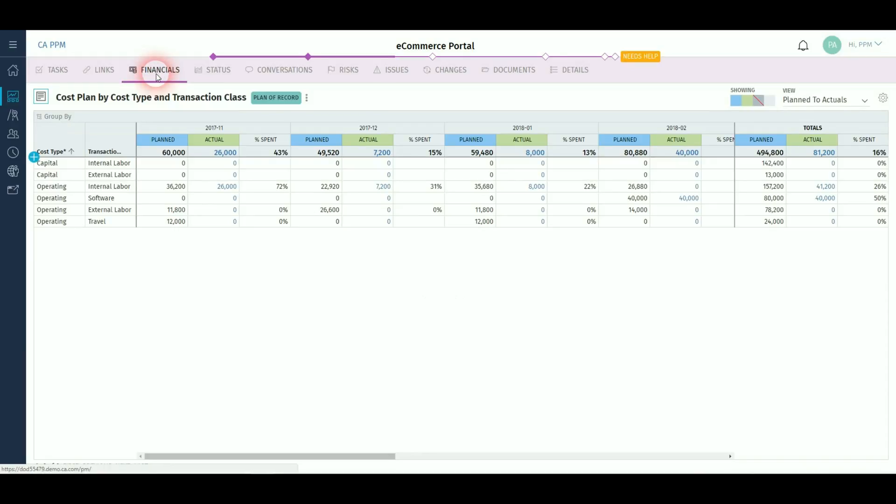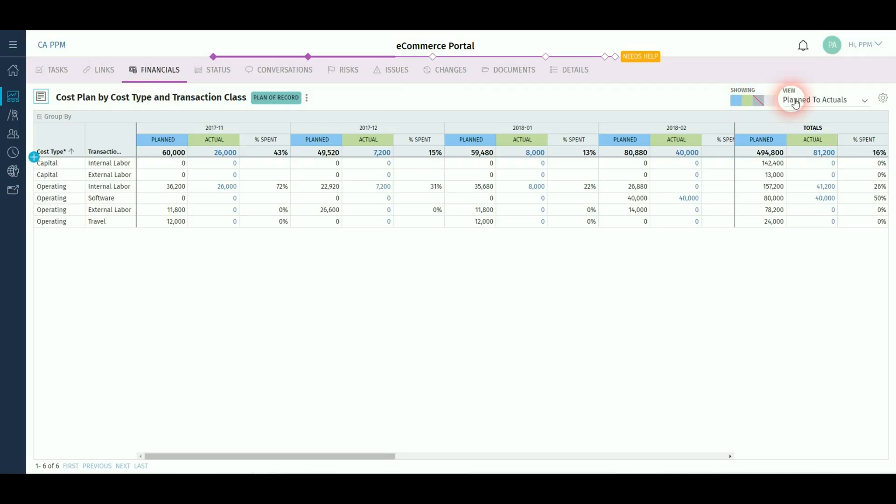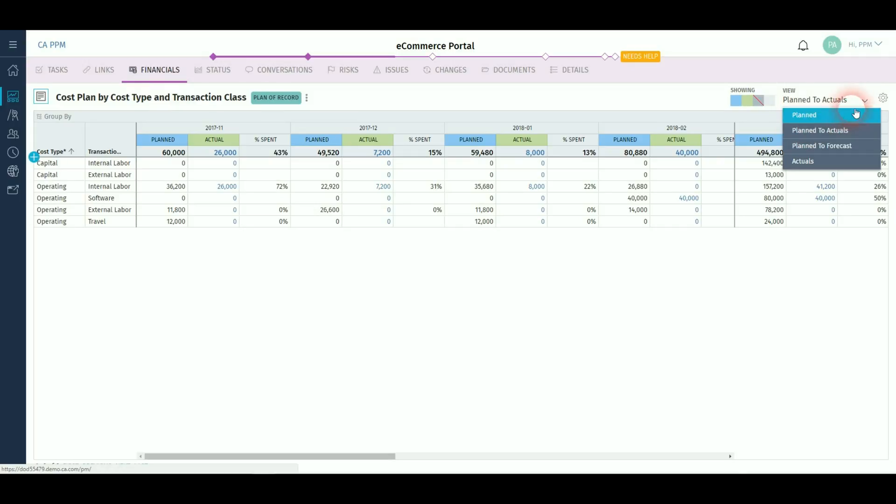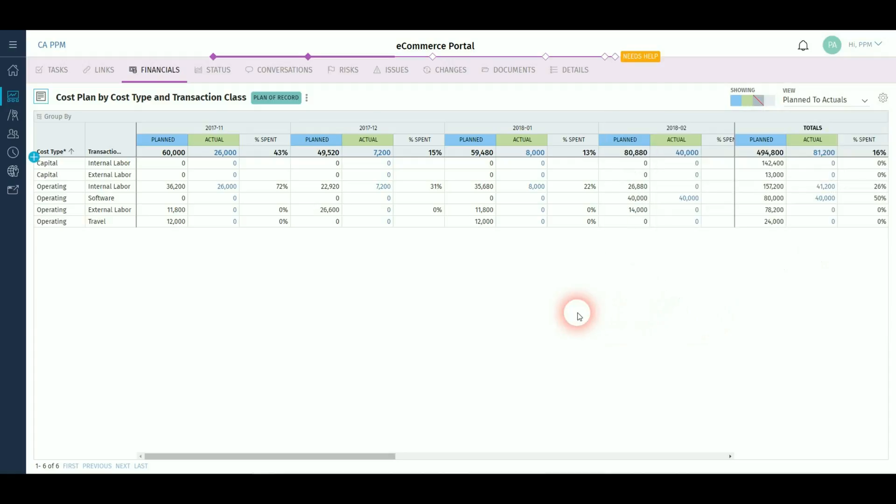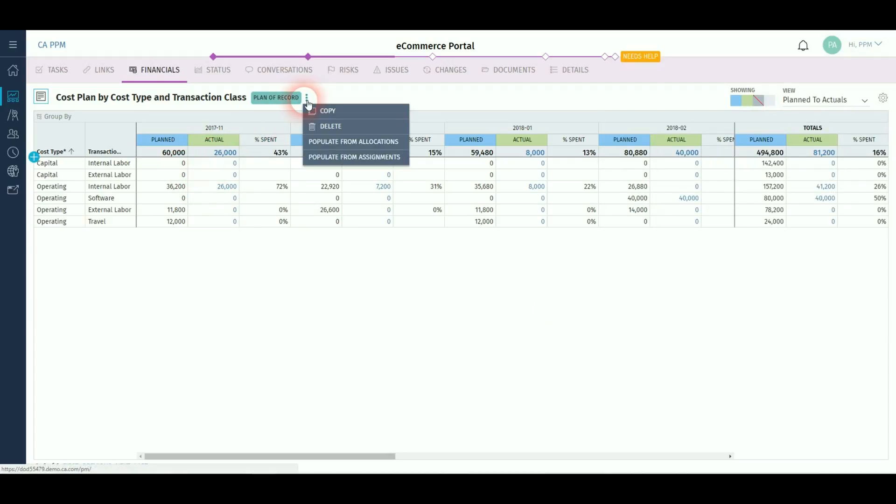You can create financial plans and display or hide relevant information such as planned, actuals, time spent, etc., and show different comparisons. You can also change the settings of the cost plan so that you can, for instance, change the time period of your display and name or description or time span. You can copy the existing plan or delete or repopulate from the allocations or assignments.